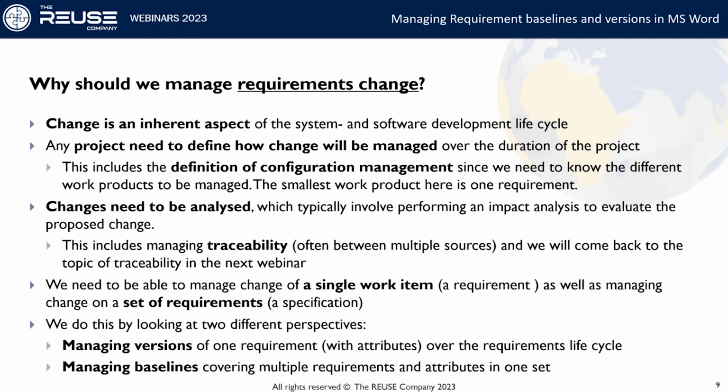And that includes how we define how change will be managed from a configuration management aspect. And when we have a change, that change needs to be analyzed. So we need to be able to do what we call an impact analysis with different stakeholders so that they can review and decide the appropriate action towards the change.